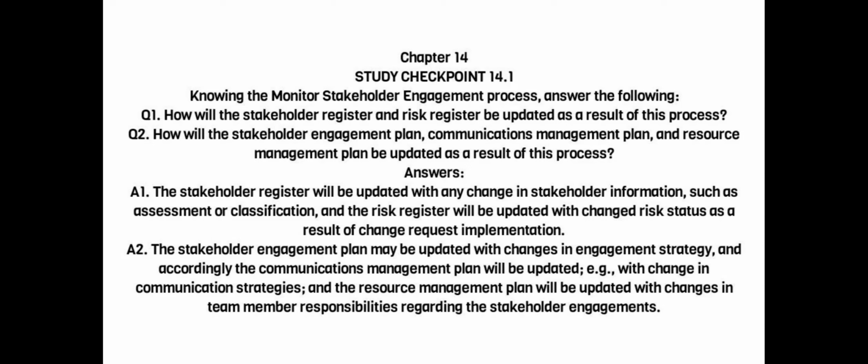Q2. How will the stakeholder engagement plan, communications management plan, and resource management plan be updated as a result of this process? Answers. A1. The stakeholder register will be updated with any change in stakeholder information, such as assessment or classification, and the risk register will be updated with changed risk status as a result of change request implementation.